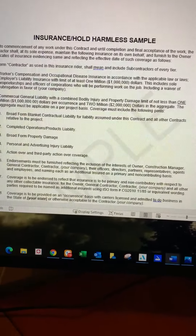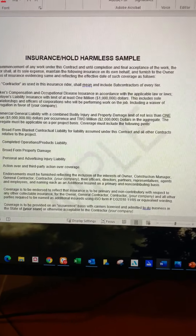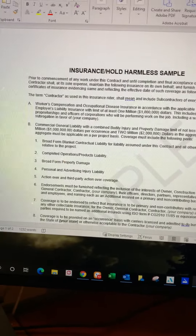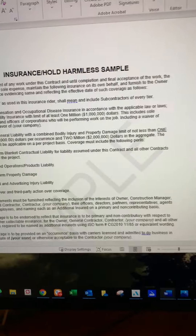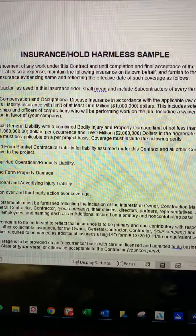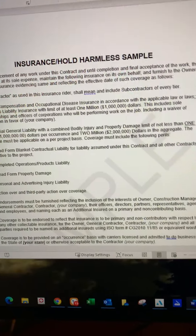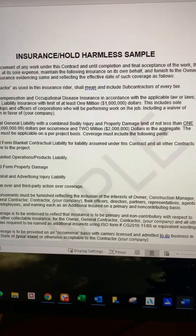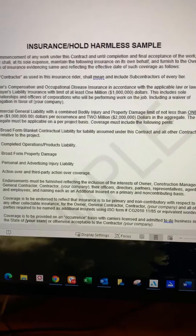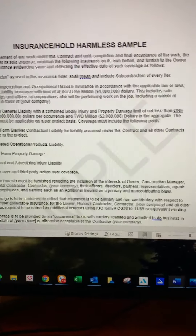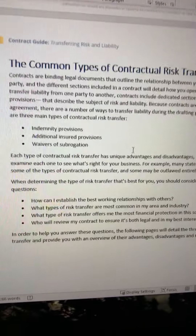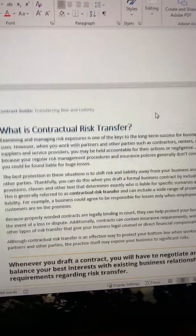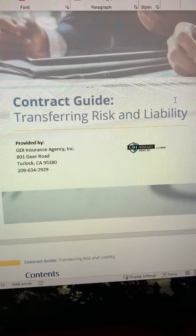These things have to be required by a written contract. Every additional insured status form says on line one: 'as required by a written contract, we will...' — and then gives you what you're looking for. If someone issues a certificate of insurance with an additional insured on it but it's not required by a written contract, it's not going to attach the way you want it to. You're not uninsured, but you really chose the hard route.